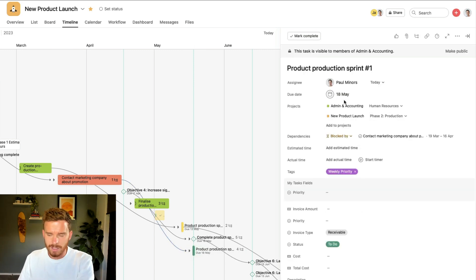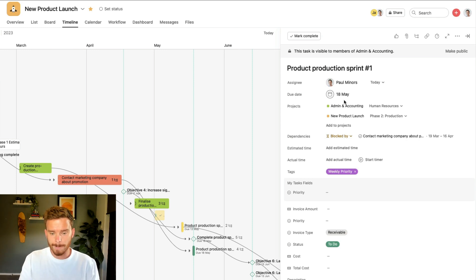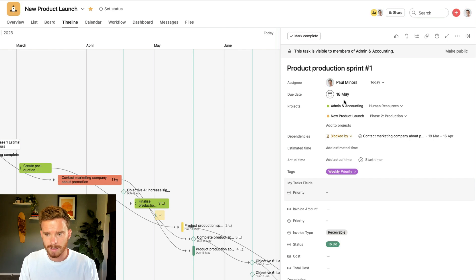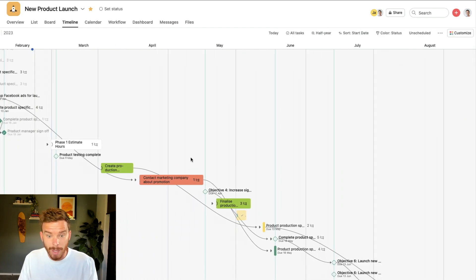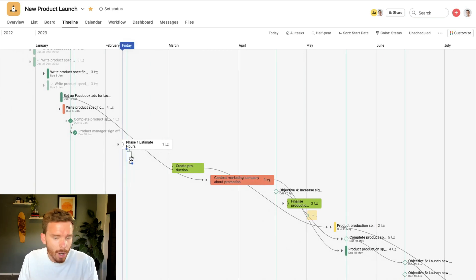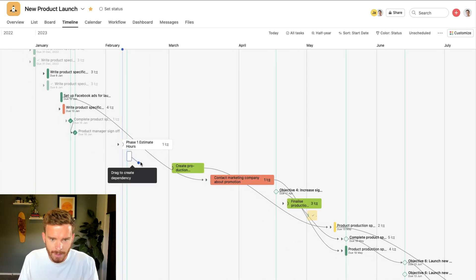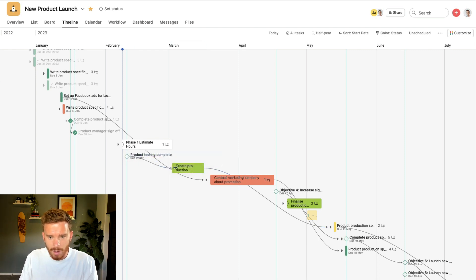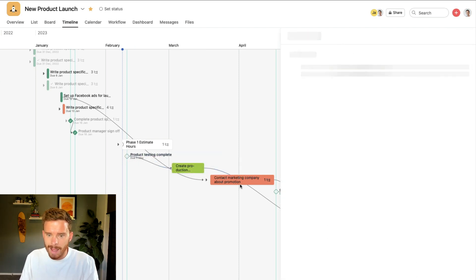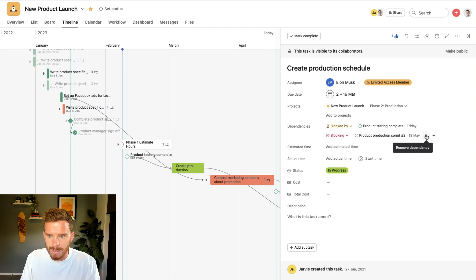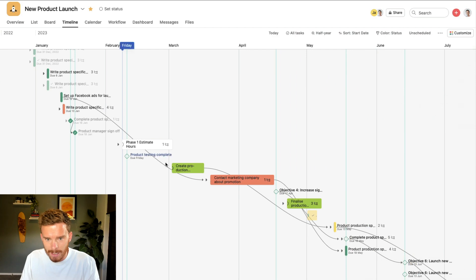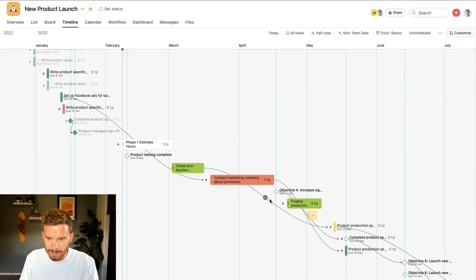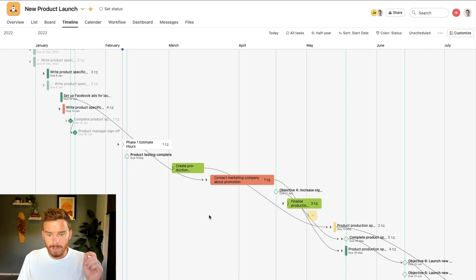I can then see that this task is also blocking the product production sprint number one task. So I can follow that arrow. And that's this task down here. That's my task as well. But if that was assigned to somebody else, they would be notified when I complete my task. So that's the first tip is to use dependencies to establish these dependent relationships. And the easiest way to do that is if you hover your mouse on a task or a milestone, you can click and drag this dot. If I drag that onto a task, I have now created a dependency.